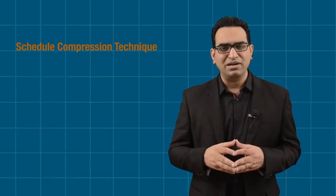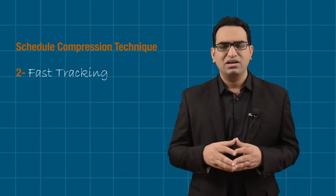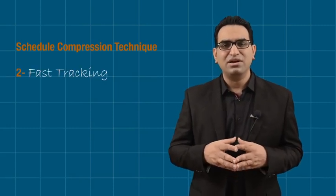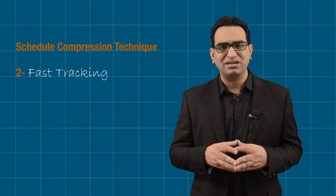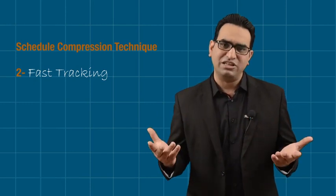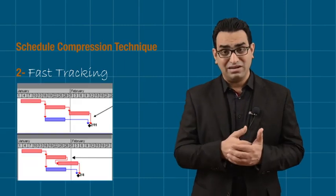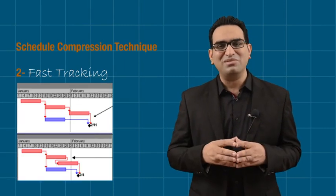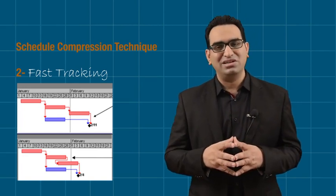Another technique is fast tracking. We've talked about lead. In fast tracking, we select two activities that are in sequence and make them parallel. This works when we have discretionary dependencies. If we have mandatory dependencies, then we cannot do this.